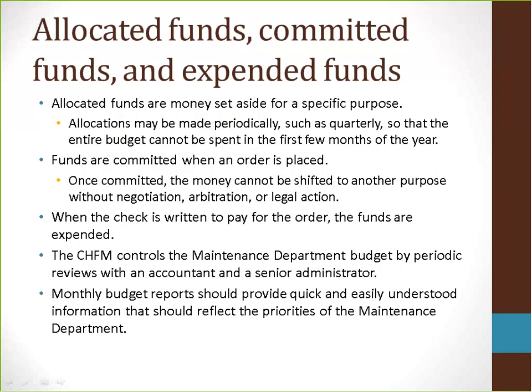Funds are committed when an order is placed. Once committed, the money cannot be shifted to another purpose without negotiation, arbitration, or legal action. When the check is written to pay for the order, the funds are expended. The facility manager controls the maintenance department budget by periodic reviews with an accountant and a senior administrator. Monthly budget reports should provide quick and easily understood information that should reflect the priorities of the maintenance department.